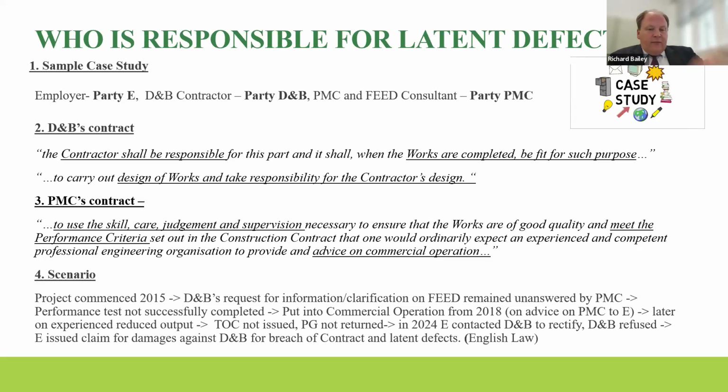I think that going back to the fundamental question, which is pursuing these things for latent defects, depends upon what it is. Is a latent defect, for example, the discovery that where there'd been a specification that you weren't to use certain types of materials in the construction of the walls, and the reason for that being that the use of certain materials is deleterious to the condition of the building. Unbeknown to everybody, during the course of works, some deleterious materials are used, and 7, 8, 9 years after work's done, you find out that that's happened, a contract's been signed under a deed, you go back and you make a claim for that.